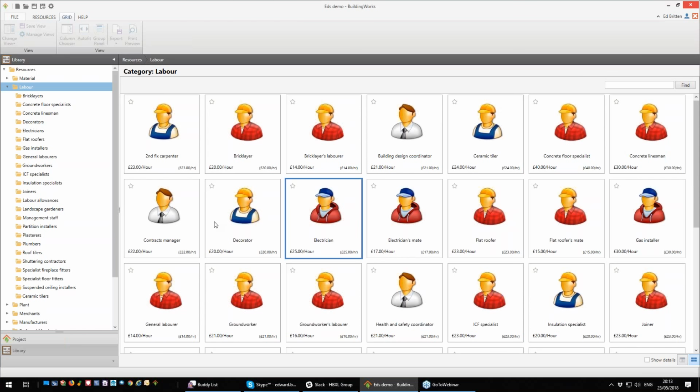What you can do is once you've done an estimate, you would actually have a look at, say, the top 10 products by cost, and then go into here, find them and adjust those, because that will have the biggest impact on your job. By the time you've done 3 or 4 estimates, you'll have actually modified all the high cost items to be the correct price. It's probably going to take you 20 minutes, if that.